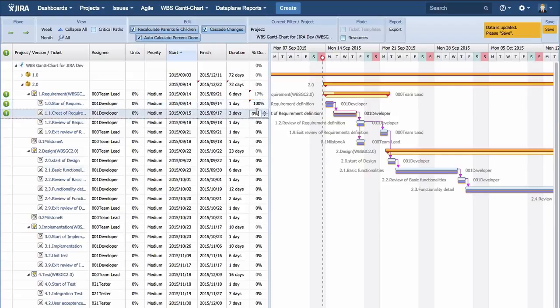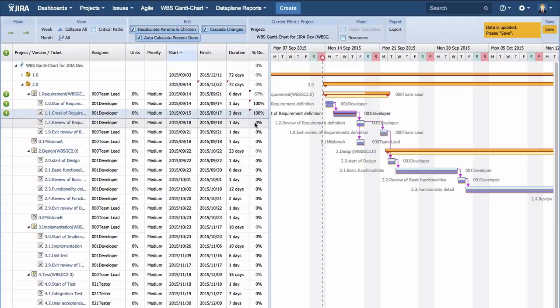When each assignee enters this percent done, the project manager does not need to ask each assignee and the productivity will go up.